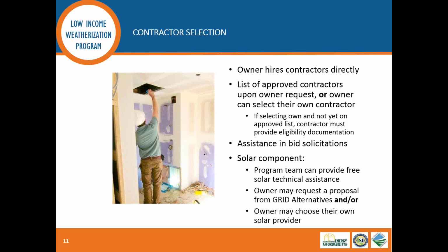It's the owner, and the owner exclusively, that makes the decision to hire a contractor or multiple contractors to perform the installation work. We will provide a list of participating contractors, which we will provide to owners when they request it, or the owners can bring forward their own contractors, as I mentioned. We also will provide assistance to the owners on developing bidding documents and soliciting bids from contractors.